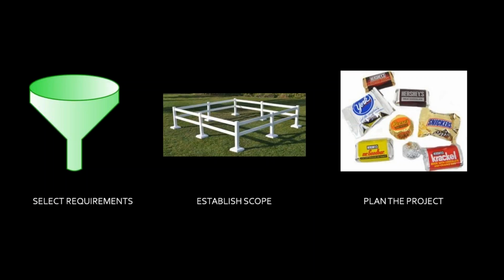So if I do it bite-sized, I'm very precise, and therefore I add up all my bite-sized pieces and I come up with a final schedule and a final budget. Obviously, it's not as simple as this, but this is the mindset. This is, like I said, the regular guy thing that I like to do. This is the mindset you use as a project manager.